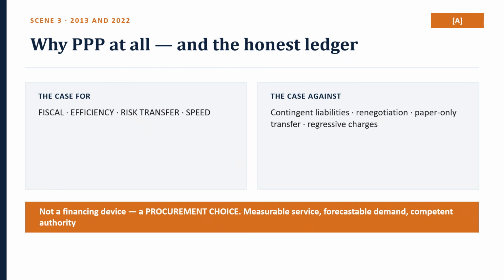The two further factors the 2020 question specifically invites. What is the first one? Financial close and the cost of capital. A concession must be bankable. The lender, not the bidder, is the real counterparty, and termination payments exist mainly to make lenders whole. And the second one is renegotiation.